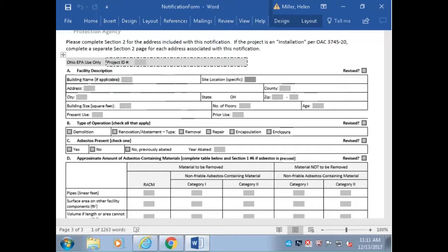So the next one: if you add asbestos abatement volumes to a given project, does this require additional fees? It's going to be dependent on the amount that it goes up by from the original submission. If it's more than the amount that's required, when you look at it by units, then they'll invoice you for the difference.